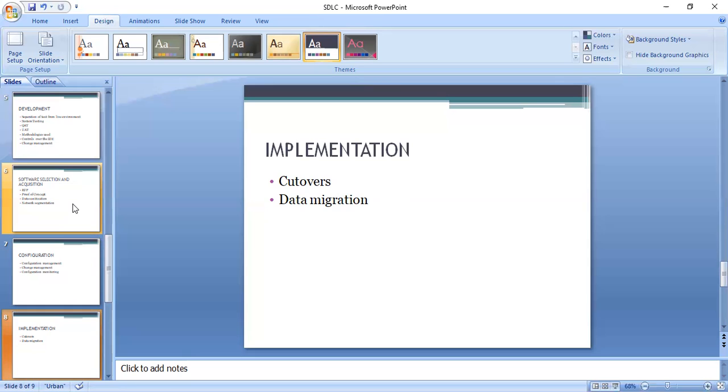And the worst case scenario should also be imagined, that it's possible that it's going to be a flop. So you have to provide for what we call a fallback scenario, so that you don't completely cut the bridge. So keep the legacy system ready to go, just in case. It has happened before, even in Nigeria. If there is a need for you to go back to the old application, you should be ready to do that until you give the system another try.